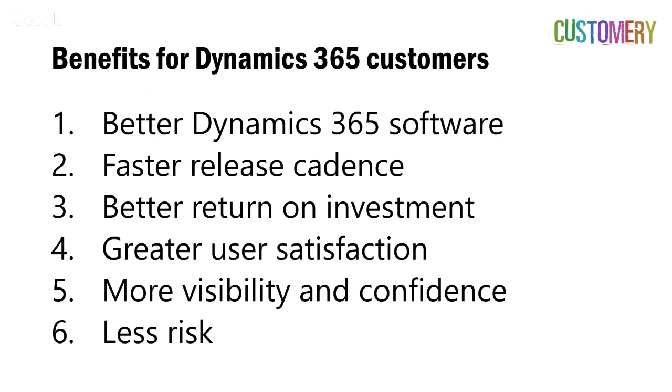One of the things about Scrum is we don't spend any time analyzing stuff that's not going to get implemented. So sometimes in a traditional project, we'll do a big analysis phase and we analyze everything, every potential requirement, even though we know some of it won't be implemented. In Scrum, we don't do that. We leave the analysis until we're just about to implement it. So we never waste time analyzing and designing software that we're not going to implement.